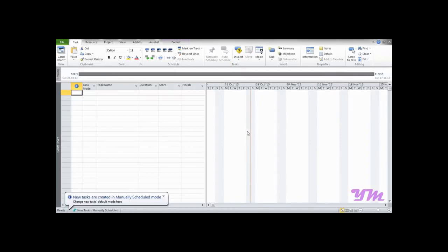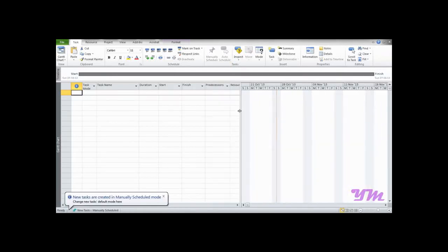So now this was about creating the three different project files. Now we need to make another different file in which we will put just only resources in the resource sheet. So to do it, go on to view, resource sheet, and now we need to place the resource name. Say we have two resources R1 and R2. Both are of the type work, and suppose say we have maximum of 10 in both the cases, and say the rate is 100 per day and 200 per day.